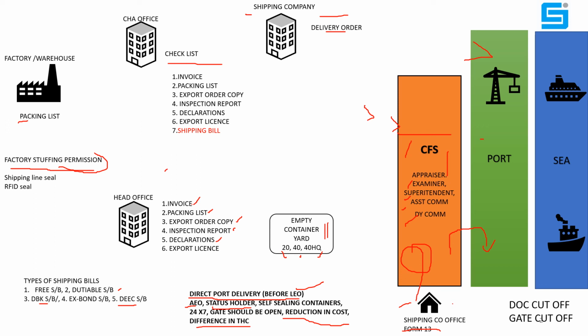See, there are two things you have to remember: doc cutoff and gate cutoff. When the cargo is under clearance or you are taking the delivery order, it is planned that this container will be loaded on a particular vessel, because every company has scheduled vessel berthing.